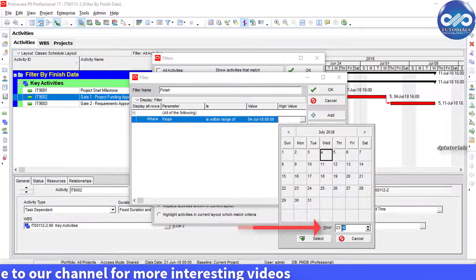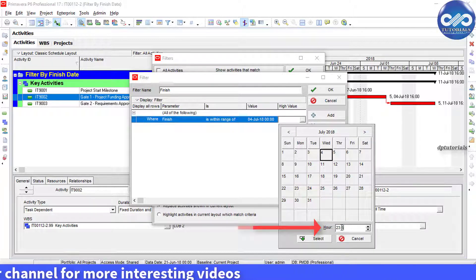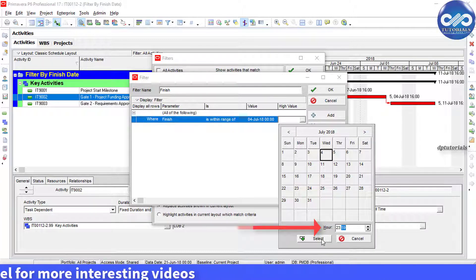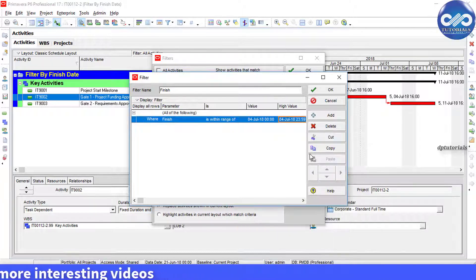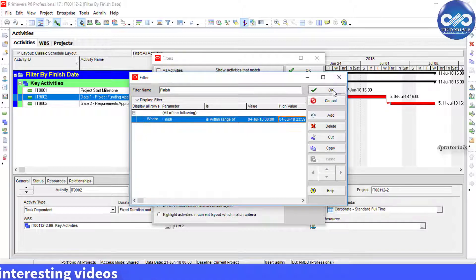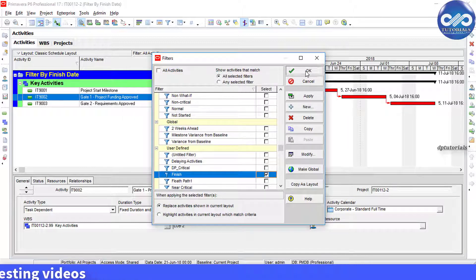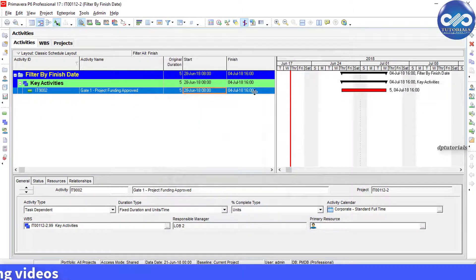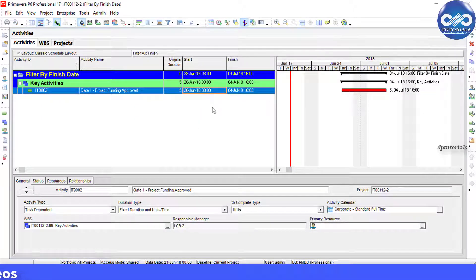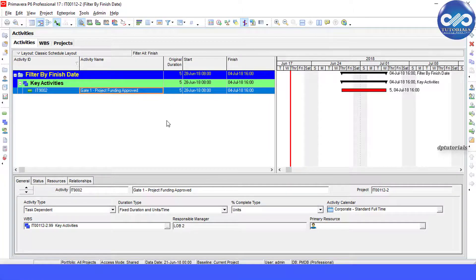Now click OK. Now you can see that P6 is showing the activity which has finish date of 4th July 2018.